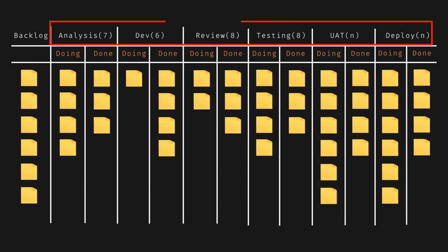Now, what do I mean by workflow? Workflow is nothing but the order of the steps that a particular work item type takes. It is a series of actions that happen to those work item types. For example, is there any analytical step or a review step or a test step or documentation step that the work item takes? That will become your workflow. Kanban board is not merely to do, in progress and done written on a piece of paper, which most people like to believe. It's more than that. It's crucial to understand how the work truly flows.